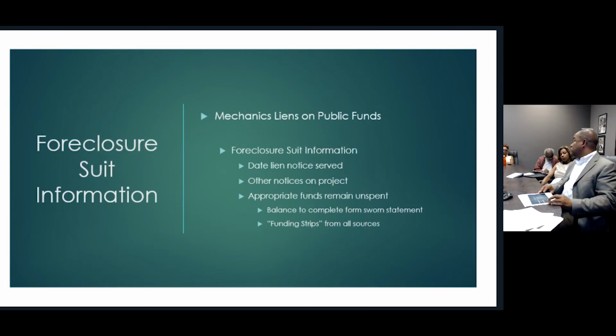Now you got to file suit, right? Within 90 days of giving that notice, you got to file suit. And your suit information should contain the date the lien notice was served, forgive me, because I should have said to who you serve notice on. You should also put that in on your suit information.